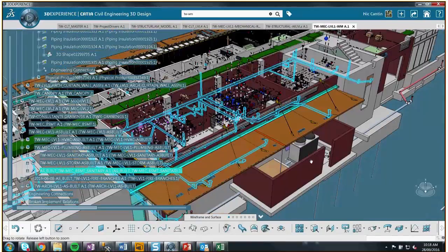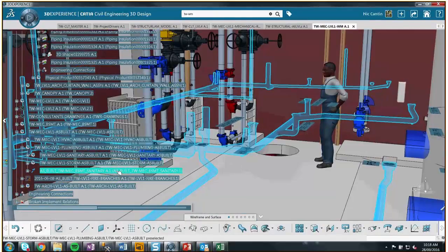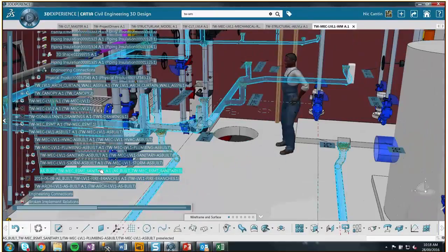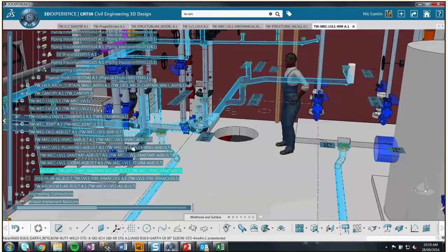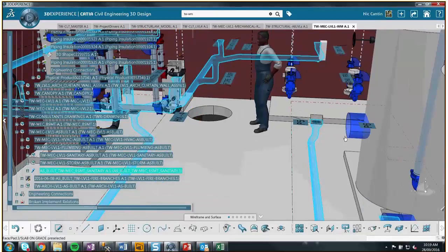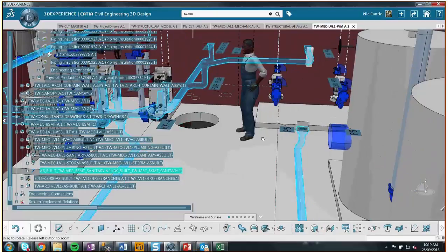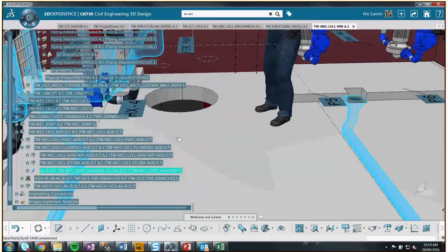And that locks the geometry, and from there we have that as a reference at any given time, and then we can change our model, manipulate our model, and we have that as a background as well. So managing the as-built in that sense was helpful as a visual, and since everything's parameterized, we can pretty much quickly make those modifications as we get data and info from site.